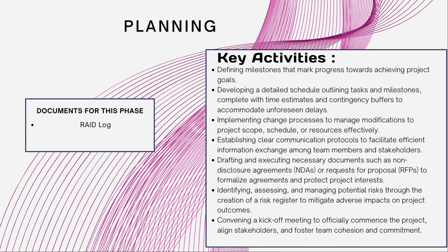Now, the document that you need for this phase is the RAID log. The RAID log stands for risks, assumptions, or some folks use action items, issues, and then decisions. Or some people say dependencies, like what is dependent on this activity before we move on in the project.